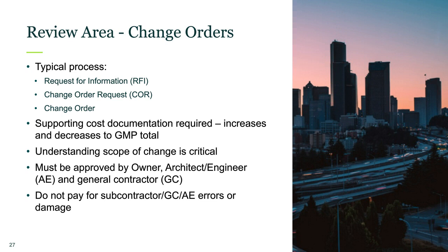A recent one we came across was Subguard insurance on self-perform work. They included the Subguard insurance markup on that change order piece. So the self-perform work was not enrolled in the Subguard program, so it was an excessive fee markup that was not allowable. And again, I like change orders that are itemized and contracts that limit profit percentages at the sub and sub-tier level. If you have subs and sub-tiers, there can be quite a few of them, so having a cap on the total sub profit with itemized detail can prevent excessive fee getting charged to you.